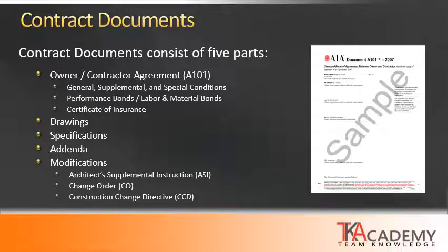As you can see, an architect has a very large role in assembling a lot of this information: the construction drawings, specifications, addenda, modifications, and in some cases even the actual written contract with the collection of bonds and insurance. That is why an architect is involved during construction, and the services are referred to as contract administration, not construction administration.